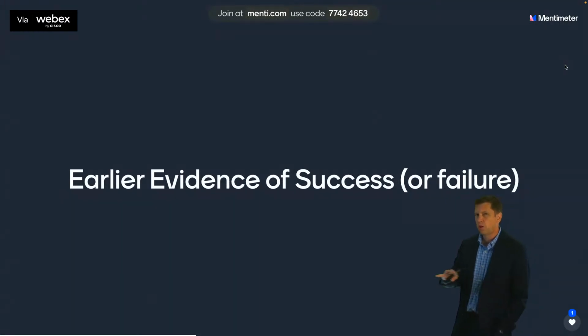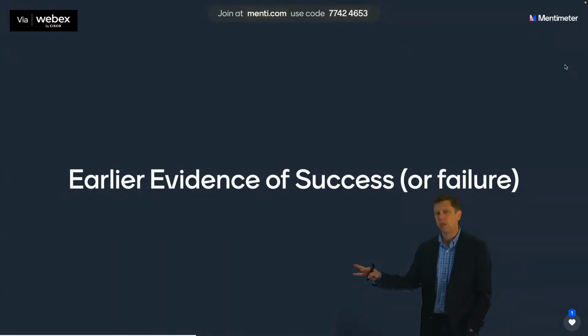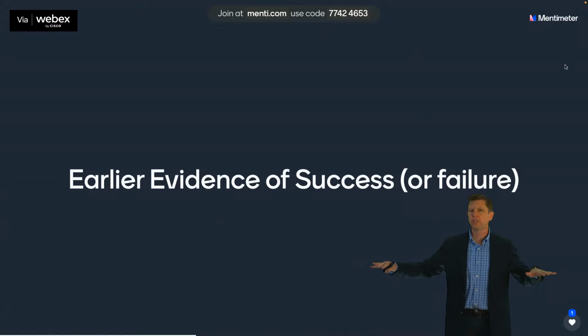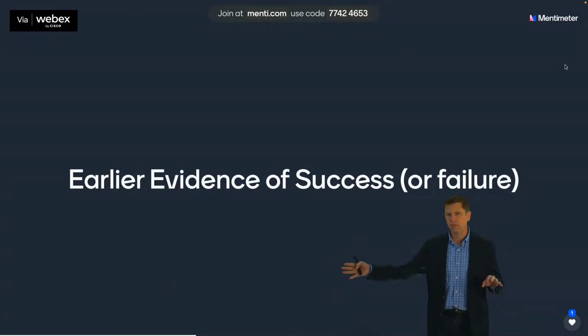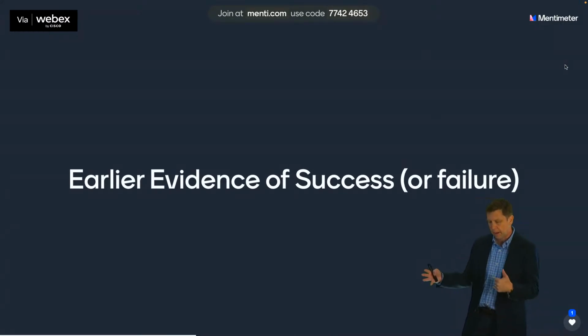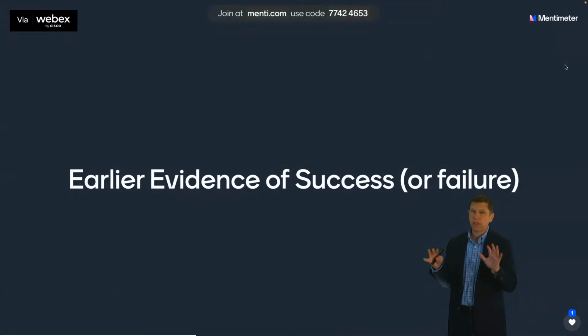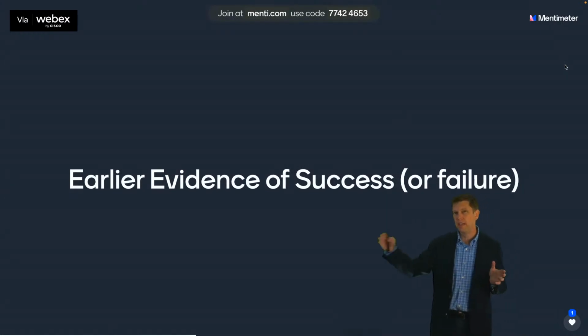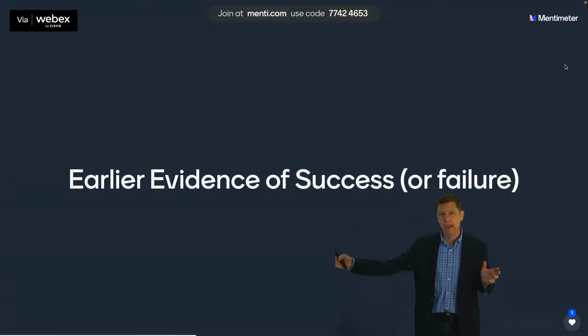So there's all this work we want to do before we start working on stuff that the customer can see. So we're going to build all this foundation out first, and then we'll start on the software pieces of it. So let's say they expect it to take 3 years, and for some reason, this foundational work is mapped out to take a year. Well, that means you're not really going to have any evidence that anything can be produced till at the end of that year, and even beyond that, right?